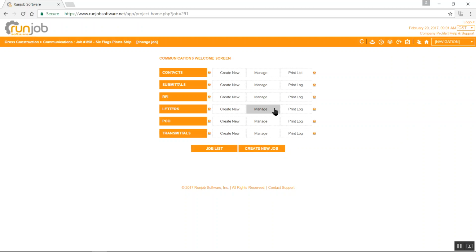So if my company is Cross Construction and it is designated by CC, and I'm writing a letter to Johnson Rebar, the letter number created would be CC/JR-001, because it's the first letter that I will have written from my company to their company. It will also be serial letter number 1. We talk more about that in the letters log.